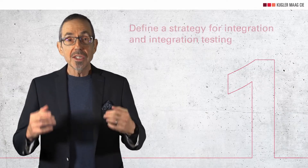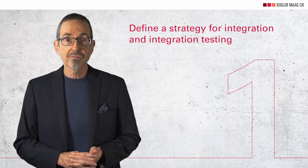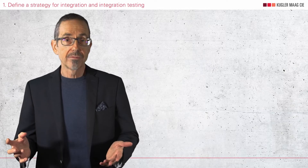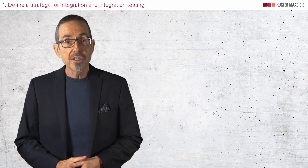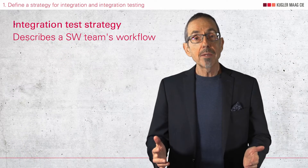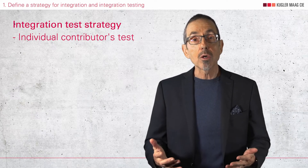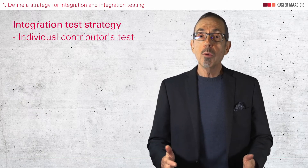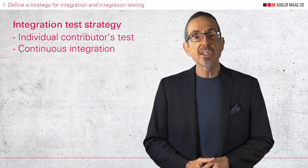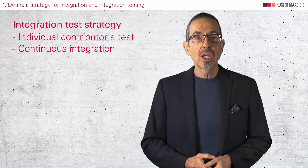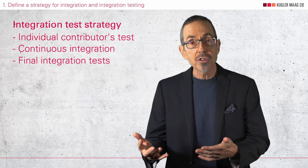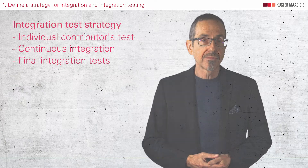Let's take a look at the three most important points of the software integration and integration test process. Point number one is: define a strategy for integration and for integration testing. A strategy is an easy-to-understand instructional description. This is especially important for larger distributed projects so that all people know how we do it. This strategy first describes the workflow of the software team, starting with the individual developer, who could perform some simple integration tests before delivering his software into the teamwork stream.